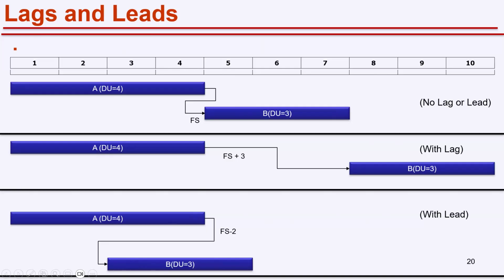So what you're also understanding from that graphical presentation is, if there is a lead or lag, that only impacts the successor. There is no impact on the predecessor.